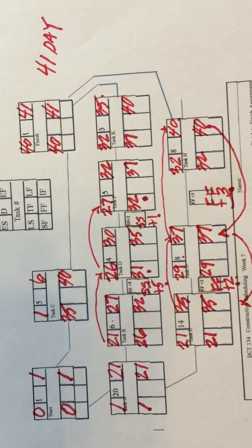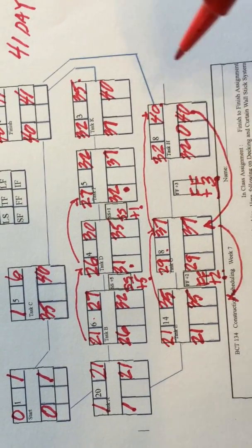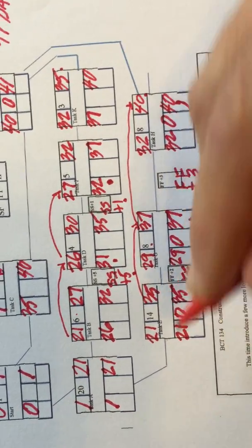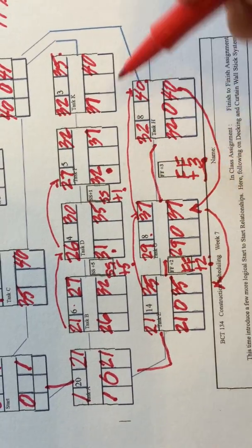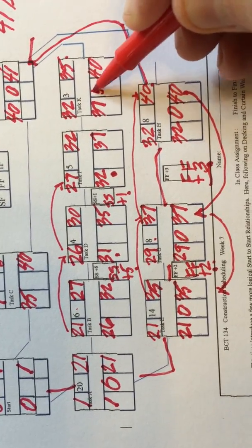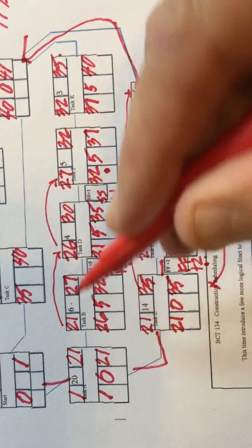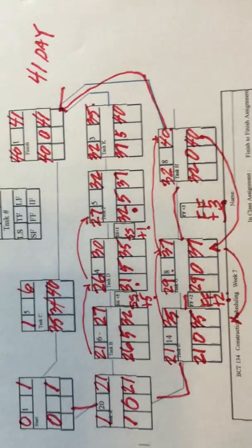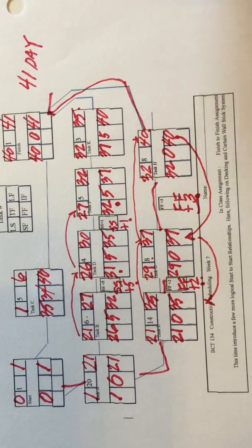Now I can see my critical path is where I've got no float. So that's here, well, the finish date, here, here, here, and here. So the critical path is going like this. And then these guys have float. 5 of float here, 5 of float here, 5 of float here, and here. And these guys have quite a lot of float, 34 days of float. Okay, so I hope that helps understand this in exactly less than 6 minutes.